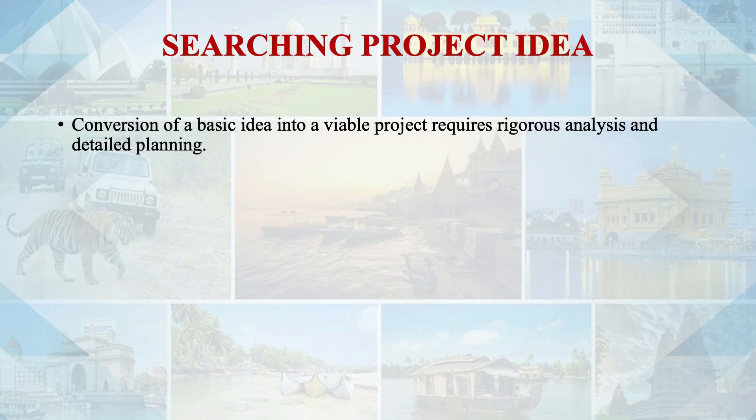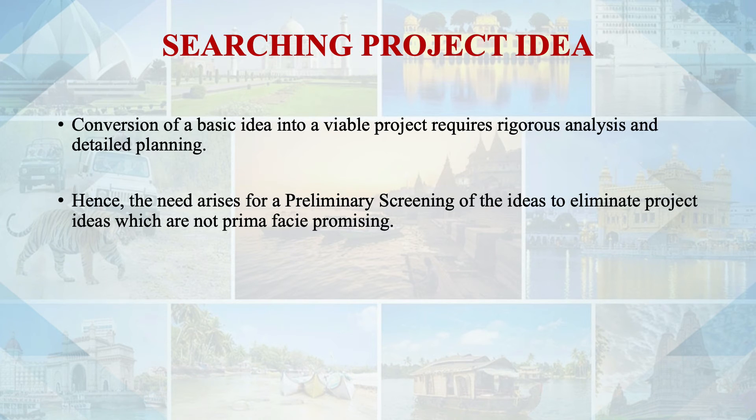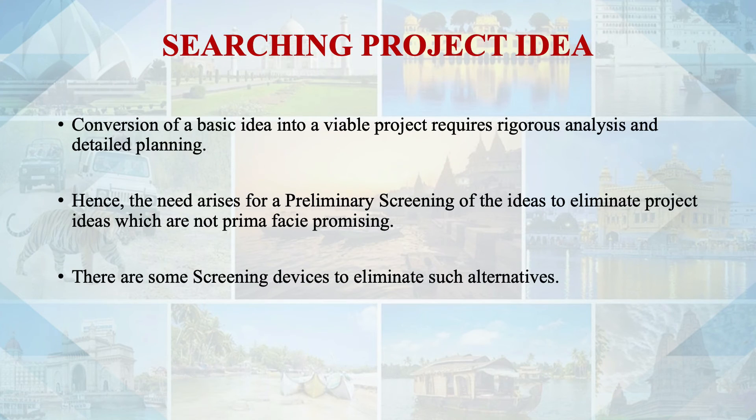Converting a basic idea into a viable project requires rigorous analysis and detailed planning. Hence, a preliminary screening of ideas is needed to eliminate those that are not prima facie promising. Screening considers multiple dimensions — finance, operations, technology, and legal aspects. For example, gambling may work in Las Vegas but is not viable in India because legal aspects do not approve it.